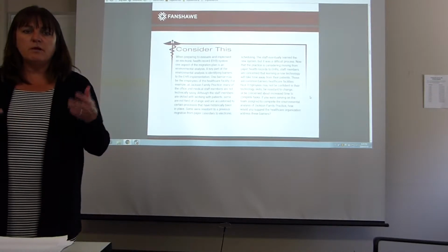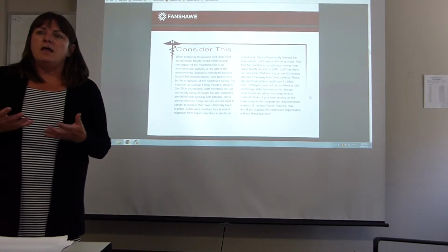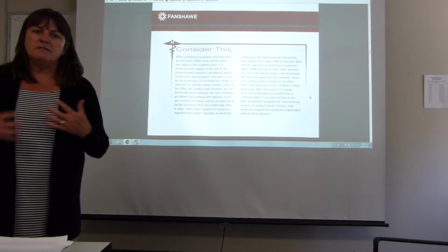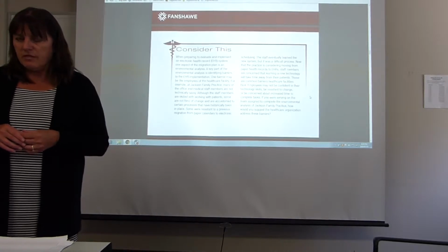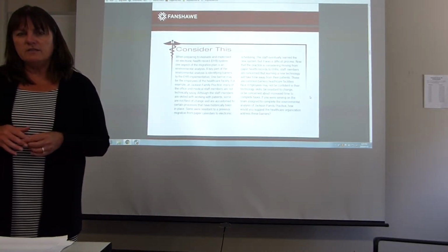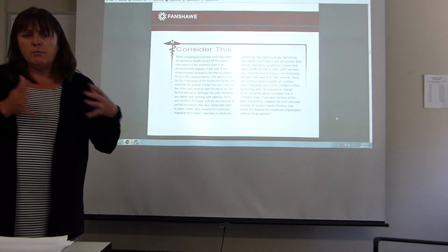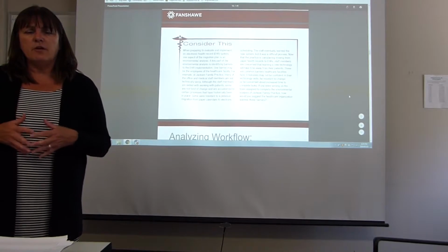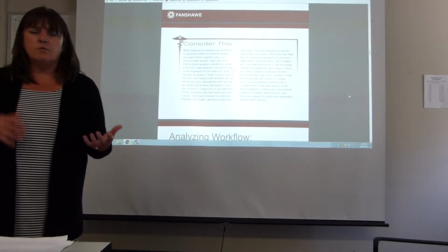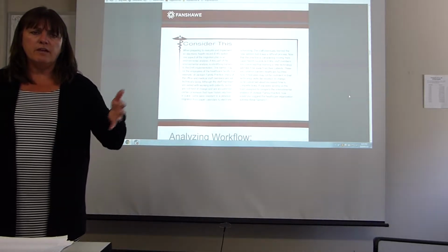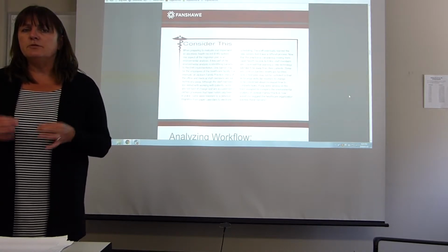As I said previously, one of the challenges that we ran into was the need to increase the skills of the physicians with their basic understanding of Windows terminology. So that was one thing that we hadn't really considered initially until somebody came forward. Also thinking about any previous implementations that occurred and how did people accept them and adopt them? Were there the resistors? Were there the early adopters? Were there the innovators? And who were those people? And what are we likely to run into this time?